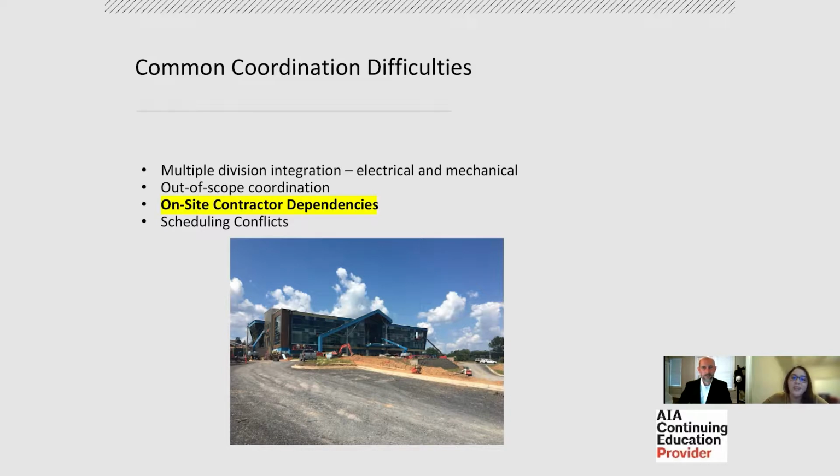You, as the client, are going to want a competent commissioning agent that knows things, that is experienced with all these systems, that can tell you code references and design references. We're the same way. We want a technician who knows their system, knows what to do in the event of an emergency, if it's fire alarm or if other things are going on in the hospital and we need to stop right away. We want to make sure that the technician knows how to back out successfully and easily. We want someone who's able to provide information like device locations. We can't be reading our map trying to figure out where everything is all the time. We want somebody who can resolve deficiencies for us, who can handle those emergencies, like I said before, and detailed questions. Sometimes the design might not have exactly what the fire alarm guy did to the SOO. The only person who's going to know that is the one who installed the system. And if we can have that person on site, generally functional testing goes a lot smoother.